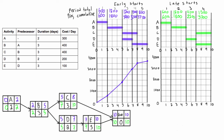For the late start curve, note that these periods aren't necessarily the same — we're missing the period ending at day 8. At the end of period one we're at $600 again. At the end of period two, day 5, we're at $1,800. At the end of period three, day 7, we're at $2,200 — so we only go up a little bit. Then at the end of period four we hit the $3,700 target. Connecting those dots gives us the late start S curve.